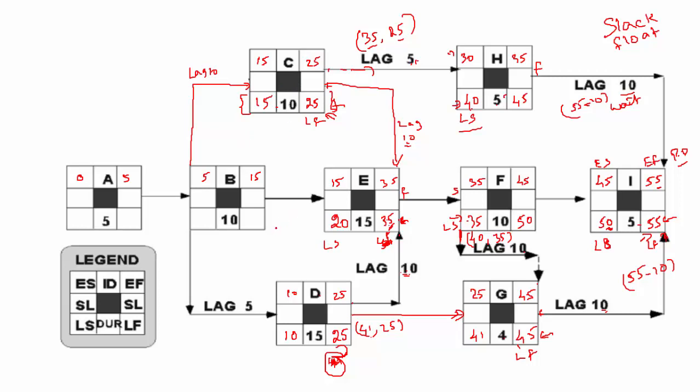Okay. All right. So now watch this for activity B. So 20. Just straight away bring 20 because there are no lags here. 20 minus 10 would be 10, but you have to wait here because you watch here, there is one arrow here, there is one arrow here. So what we have to check is 15 minus 10 would be 5. So is it 5, or 20 minus 10 would be 10. Is it 10, or 10 minus 5, or is it 5? And we take the lowest. So 5 is the lowest. So we take the 5. And 5 comes here and we have the 0.